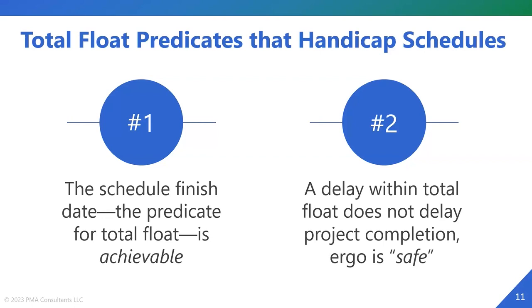It's a safe delay. But that has some big assumptions. You have one scenario of durations. You have 2,000 activities, one scenario of literally millions. So to talk about safety and delay with one scenario is pretty chancy.